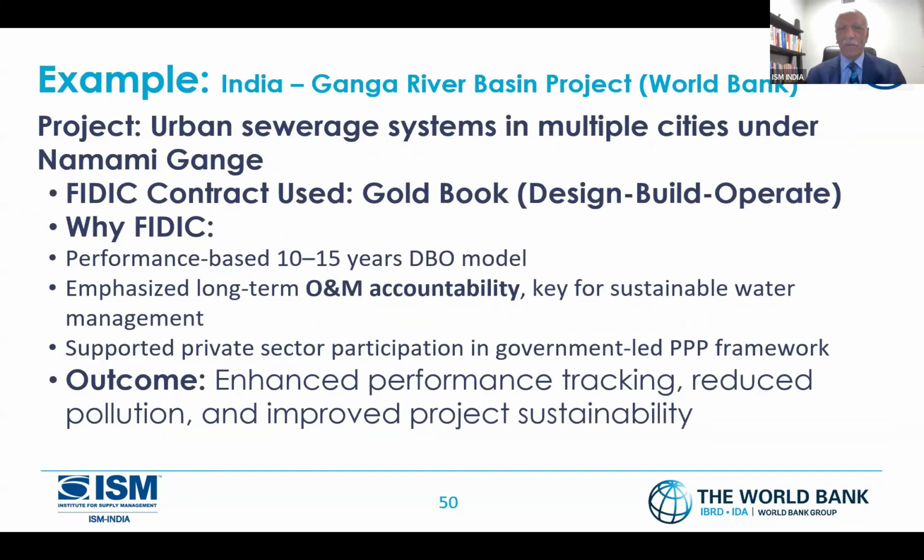In India, we are doing quite big projects on the Ganges River water. It was a World Bank funded project. We used the Gold Book, design, build, and operate, DBO. Why FIDIC? Performance based on 10 to 15 years on a DBO model. Then we emphasized the long term. The outcome was enhanced performance tracking, reduced pollution, and improved project sustainability.